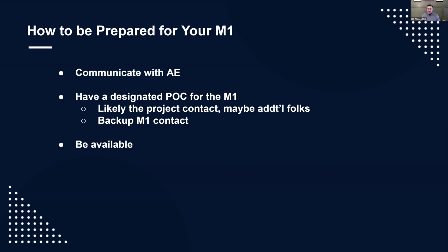Then, let's say 7-8 months go by, and we deliver thousands of deliverables every month, tens of thousands of, I think it's Aperture cards or something. And then it's like 8-9 months later, the project's pretty much done. They say, hey, we tried loading this and it didn't work. Now, we delivered exactly what they asked for. We got the M1 approval, but they had not tested their own system. It was nothing with the actual deliverable. It was just their system.